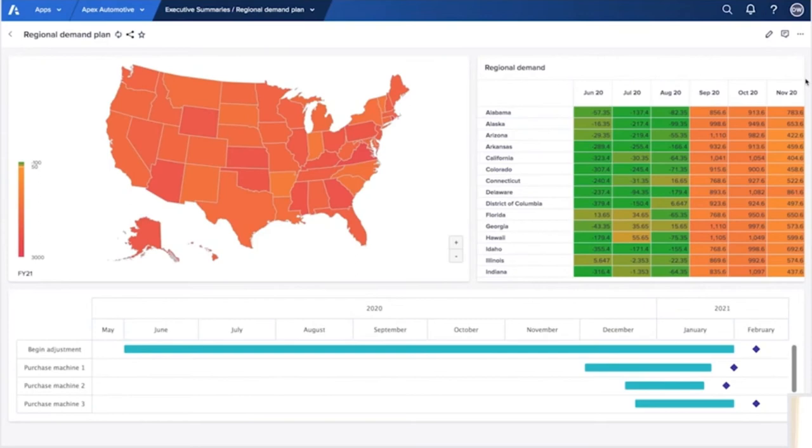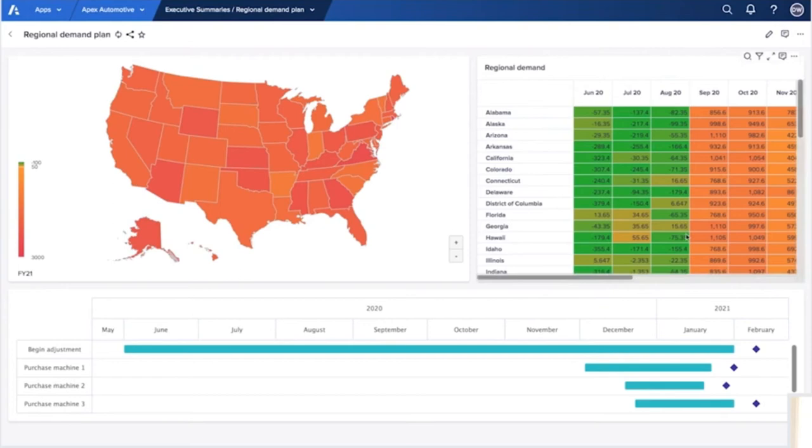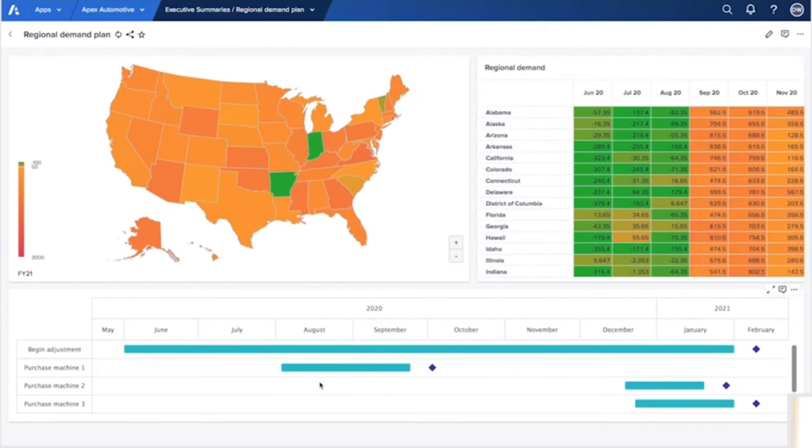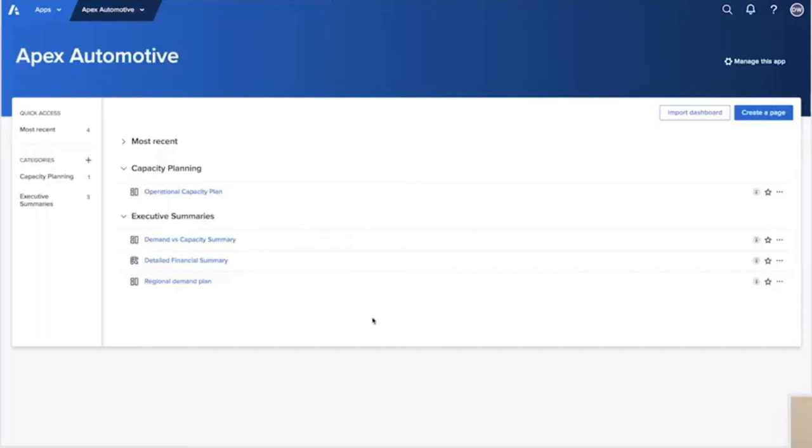As a final touch, he makes the Gantt chart editable. So Dan knows that some funding might be available a little sooner than anticipated. This is not a problem. He can very quickly adjust the plan by dragging the bars on the Gantt chart to the desired dates, seeing instantly how that impacts the data in the rest of the model.